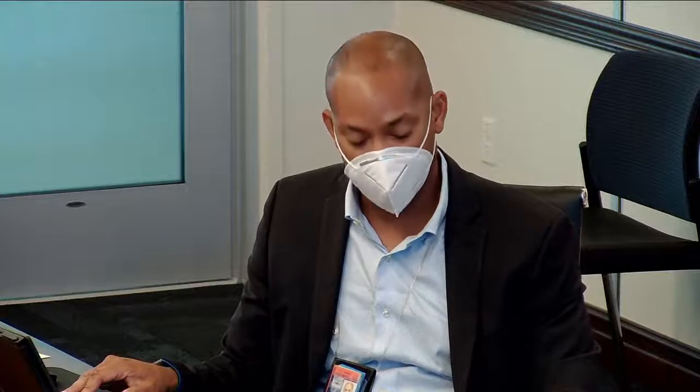So remembering the focus for the project, this is a checkpoint expansion. We've had 7 meetings with TSA, both national and local, focusing on the purchase of the equipment, whether it be CT equipment or the automatic screening lanes, which is non-staff. The space accommodates both technologies in 4 lanes and could have processing up to 180 people per hour per lane, versus the 150 that is in the existing equipment and existing tunnel now.